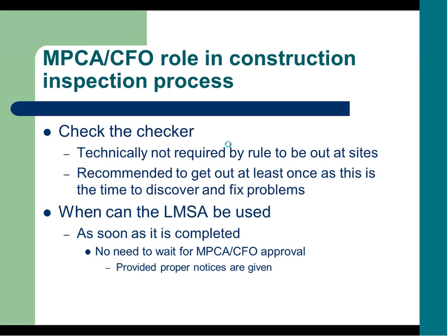What is our role, either county or PCA, when we're out on these inspections? Basically, we're just there to check the checker. Technically, we're not required by rule to be out on the sites, but to be out there at least once is recommended to help find any fixes that might have to occur or any anomalies that happen, to make sure that any changes that have been made have been cleared and are approved before they're using these structures. And also, it's the easiest place to make the fix happen. It's much easier to fix it before it goes into use.